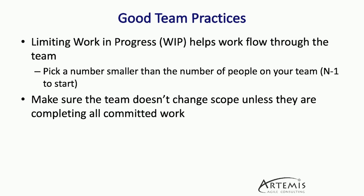Number two: making sure the team doesn't change the scope unless they're completing all their committed work. If you're getting a good burnup and your team is doing very well, you can absolutely explore bringing more work into the sprint. But don't bring more work in because there's pressure to do so. If your team is not going to deliver all their commitments, adding more work is not going to make it any better — it will just make things worse from a metrics perspective. Protect them from that kind of thrash.